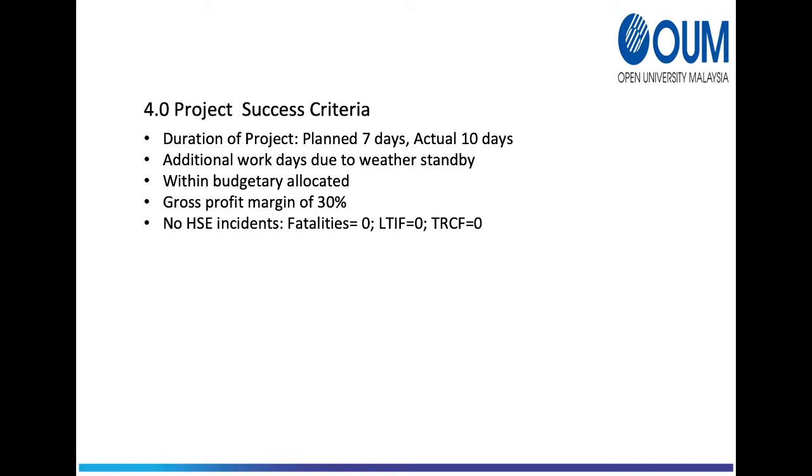Since no shallow gas incident occurred during the campaign, any extra budgetary was unused. The project managed to capture 30% gross profit margin and was considered successful. The statistical performance targets have been set to support contractor's HSE plan and client target to achieve zero. This statement makes it clear that the activities we undertake should cause no harm to people and the environment in which we work and live.